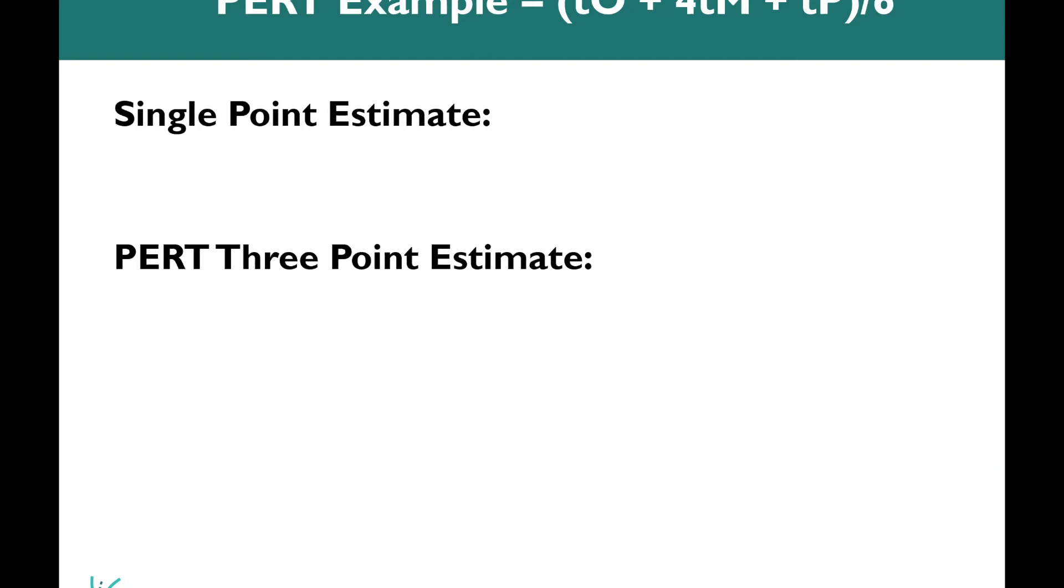Let's look at an example here at how we can calculate PERT. You'll start to see that it can be more accurate than using a single point estimate. If we were using a single point estimate, we might say, okay, we need to create the designs. We think it's going to take somewhere around 80 hours. That's a single point estimate for time.